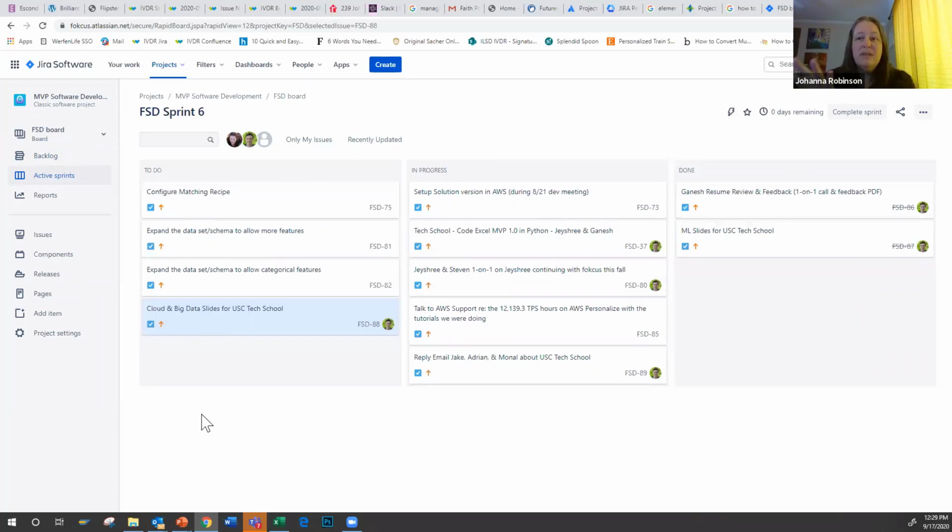And then you can use this board to talk to your team. Like, can you give me the latest update? Great job getting these things done. How are these things going? Are you stuck on anything? Do you need help to get these things started? Or, did we think about the priority or the predecessors wrong? Are these things dependent on something else? Maybe they don't even belong in the sprint and we should move them into the next one.